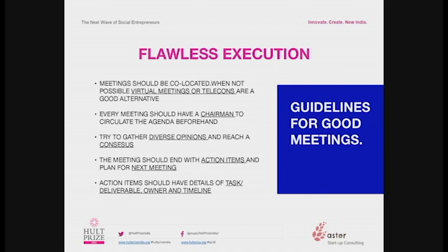Various ways to do it, but do make sure that everybody who's involved in the decision-making process is part of the meeting. Try to appoint a chairman or a coordinator to circulate the agenda. The agenda is important, so everybody knows what's the objective of the meeting. What are we going to discuss? So they come prepared. If you have some materials that you want people to read, circulate it beforehand. Send them emails. Let everybody read up. Let everybody be prepared. So you don't waste time in the meeting explaining things. The meeting is a time to take decisions, not to share information. Information should be shared beforehand.